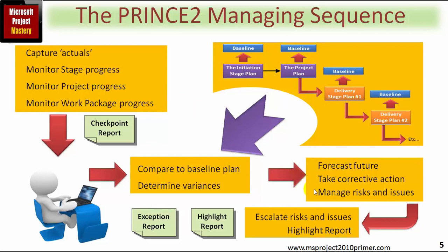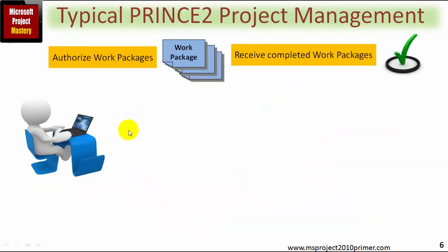When carrying out impact analysis on issues, for example, you can use Microsoft Project as a basis for looking at different options and their impacts, for example in terms of cost, time and resources. So continuing with the job of the project manager, they would need to authorize work packages during a stage, giving them out in some sequence, and ultimately receiving completed work packages when all of the products have passed their quality reviews